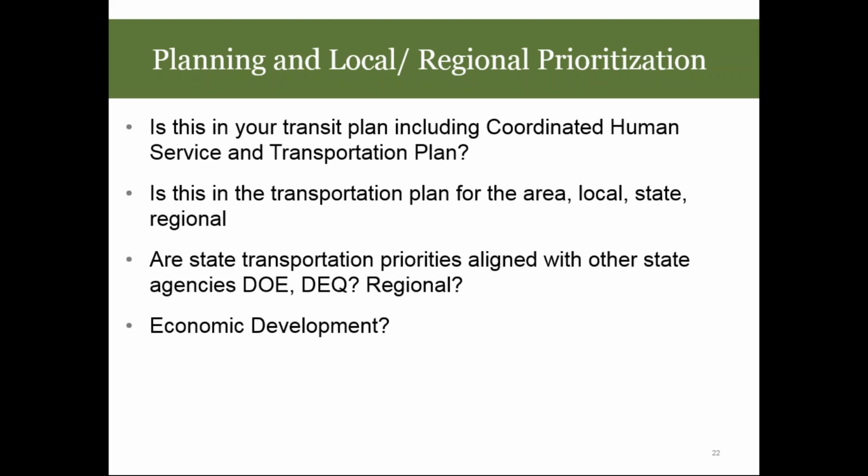In addition, it was coordination with the state and the state TIP, making sure there was a placeholder for that. The state was the funding applicant in Mountain Rides' case, and it was coordinated as Mountain Rides is a subrecipient.